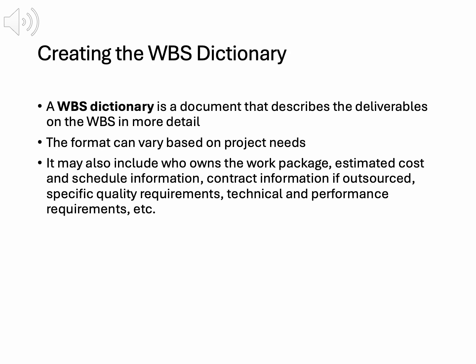The dictionary's format varies by project needs. It may include the responsible person, estimated cost and duration, resource requirements, quality standards, or contract details if outsourced. For example, the survey administration entry specifies Mike Sundby as a resource and corporate survey software as a requirement, ensuring alignment with project goals. Creating the WBS dictionary involves collaboration with the team and stakeholders to gather details. For the training project, HR and IT provide input on survey logistics, ensuring accuracy.